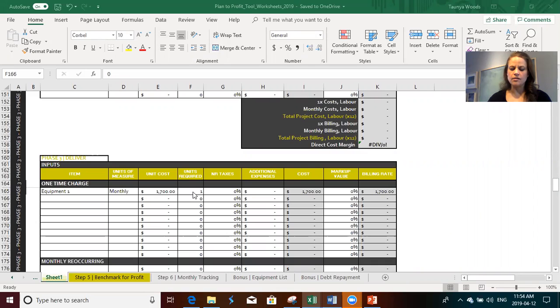Yep. And in most cases, it's 10 hours for the man and usually 8 for the equipment, because you have to have time for warming up the equipment and that kind of stuff. Yeah, in the winter. Absolutely. And don't forget dispatch, and that time too, and any sort of extra services that individual needs. All those things get missed.